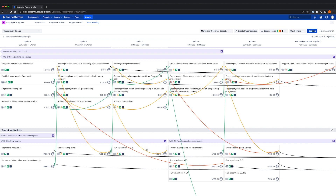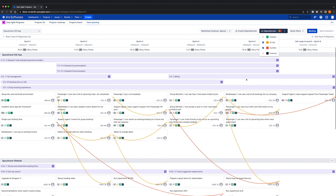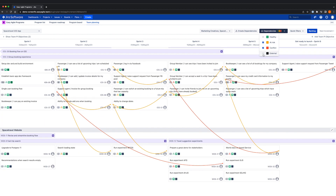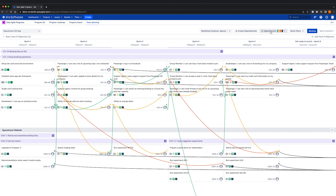If we want to focus on addressing conflict or at-risk dependencies, we can do that from the dependencies menu by selecting which dependencies we'd like to be visible. We can see how valuable it is to surface dependencies when planning, but this isn't limited to planning. During execution, priorities or scope may change and new requirements may come in. The team planning board view empowers teams to make changes while retaining an up-to-date view of how those changes impact other teams in the program.